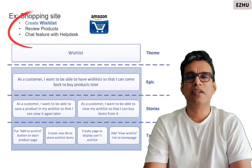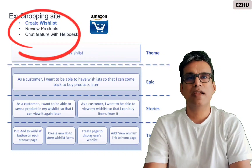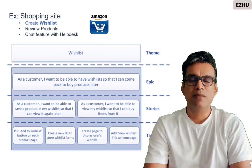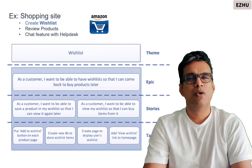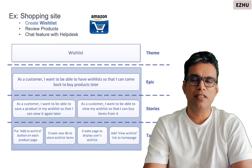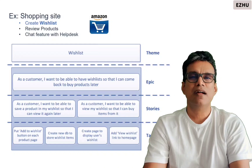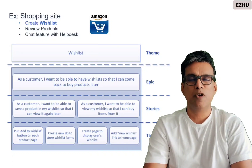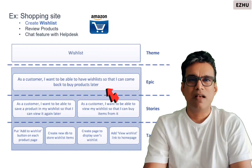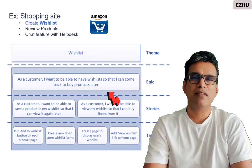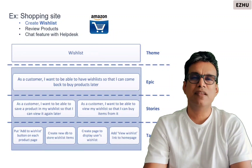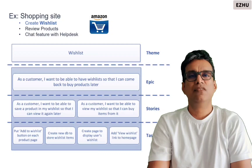In this shopping site, I want to implement certain features: a wish list where I can view products, add them to my wish list, and purchase them later. Another feature is product reviews by users, and a third feature is a chat service with support. Taking the wish list as an example — as a customer I want to view products, add them to my wish list, come back on a later date and purchase them. This is called an epic.